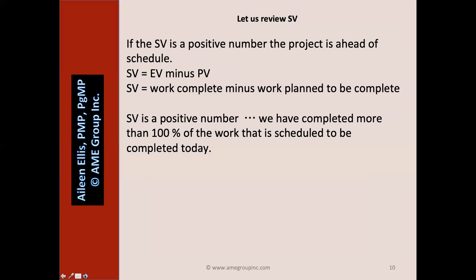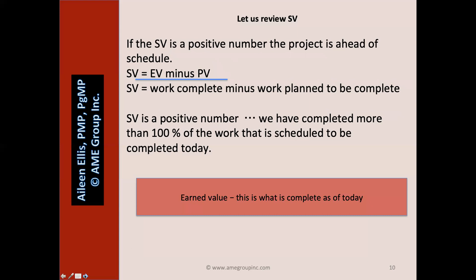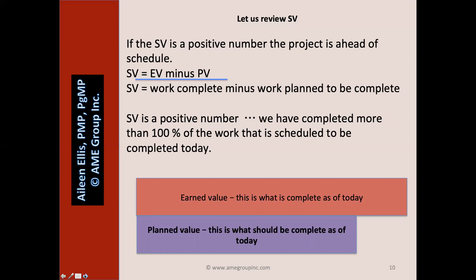If the schedule variance is a positive number, the project is ahead of schedule. Schedule variance equals EV minus PV — work complete minus work planned to be complete as of today. If it's a positive number, we've completed more than 100% of the work that is scheduled to be completed today. Here we see our earned value (what is complete) is greater than our planned value (what should be complete) — we have more work complete than we planned; our schedule variance is a positive number.